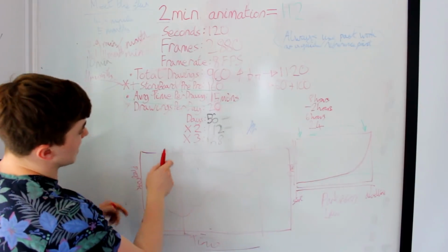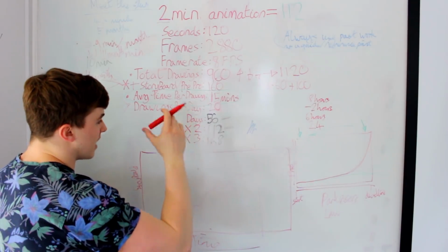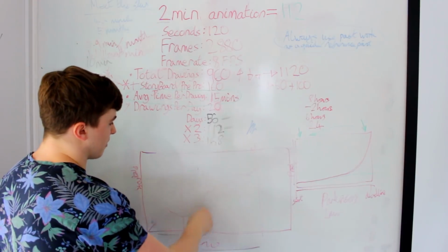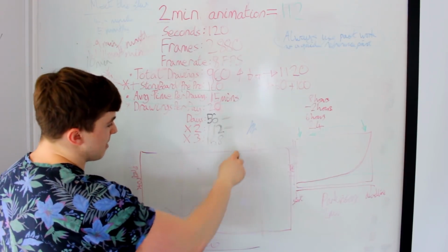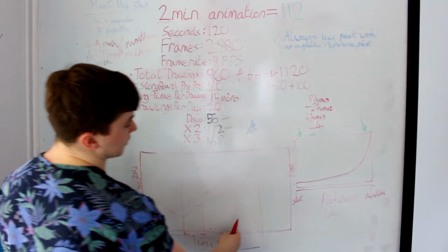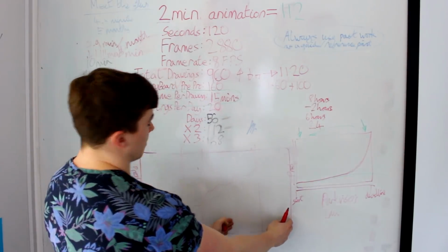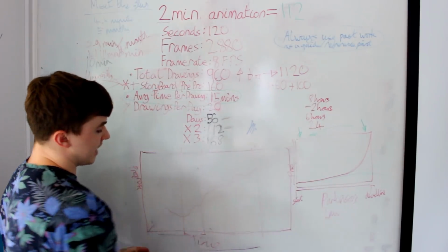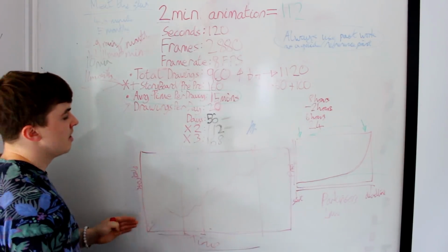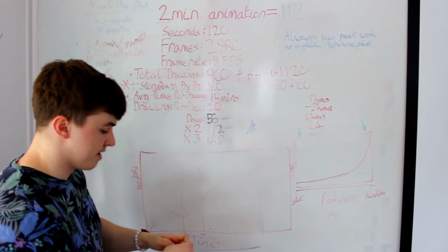Especially with pre-production, I recommend that you have an inner deadline that you stick to. Maybe it's more like here, or maybe it's even here. You have a massive time for pre-production and then you just go and execute. Maybe you're really fast at executing, you don't need much time for that, but pre-production is really important, so it should have its own dedicated time. So that's an amendment to this really. It's a different way of going about it and I actually recommend it more.